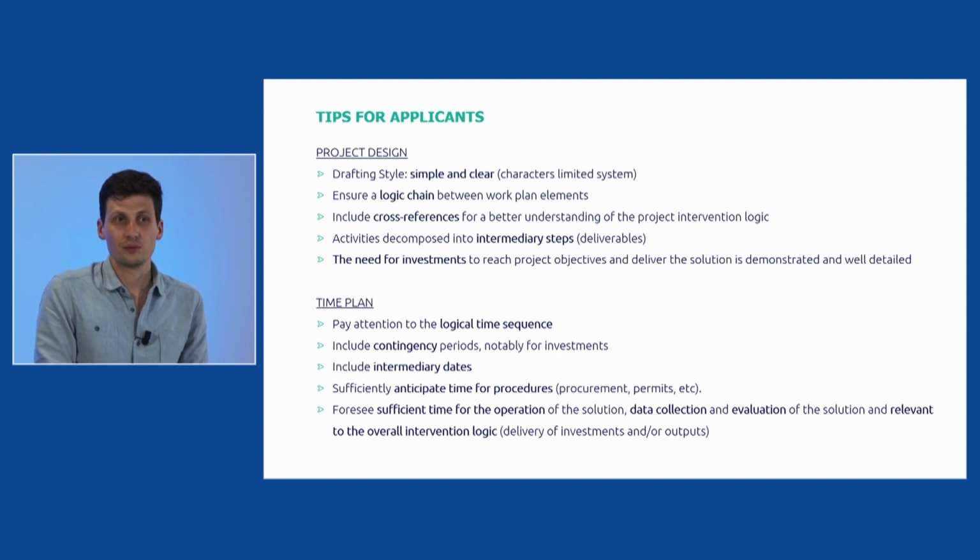Make sure to have sufficiently anticipated the time for the procedure when it comes to permits, when it comes to procurement. And remember to foresee sufficient time for the operation of the solution, for the data collection and the evaluation of the solution.